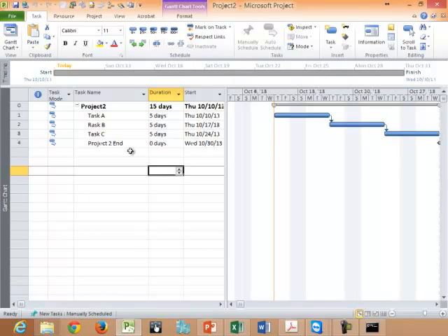Okay, so once you're done, then we try to combine. Kedua-dua project ni kita combine into one sheet. And we use the same resources to use under project 2. Then from there, you want to monitor the whole resources, also can be done. Project 2, I just simply put 0D only. Because it's starting on the 10th of October, which is actually today. Yeah, just link all together.